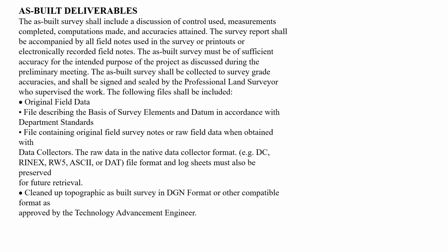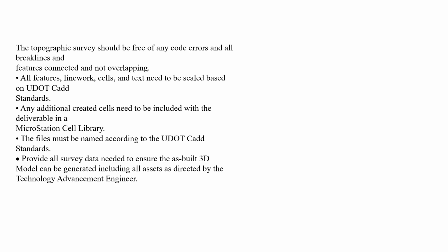For example, DC, RINEX, ASCII, or DAT file format, and log sheets must also be preserved for future retrieval. Cleaned up topographic as-built survey in DGN format or other compatible format as approved by the technology advancement engineer. The topographic survey should be free of any code errors and all backlines and featured connections and not overlapping.